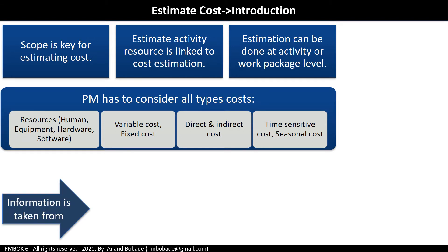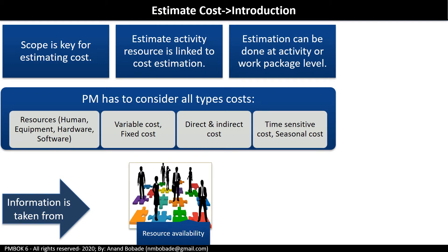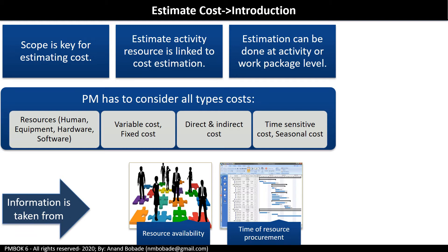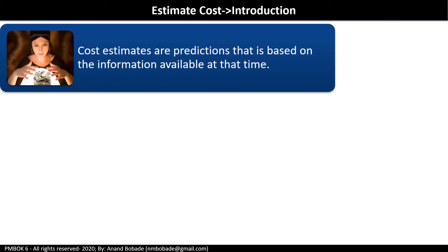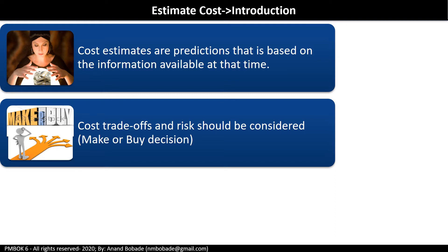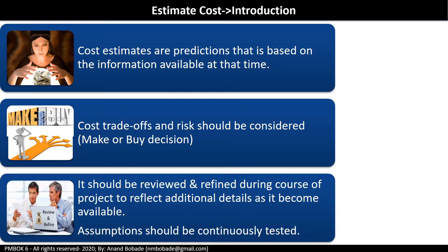The project manager must also consider direct and indirect cost, as well as time-sensitive or seasonal cost. Information is gathered from various processes — for example, resource availability from resource management, time of resource procurement from schedule management, and project financing details from the cost management plan. Cost estimates are predictions based on the information available at the time of estimation. Cost trade-offs and risk should be considered, especially during make-or-buy decisions. Estimation should be reviewed and refined during the course of the project, and assumptions should be continuously tested and added or removed accordingly.